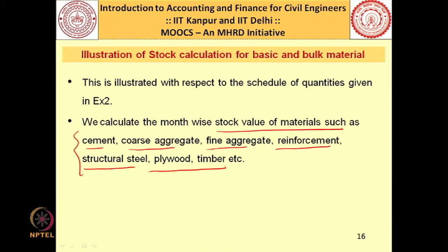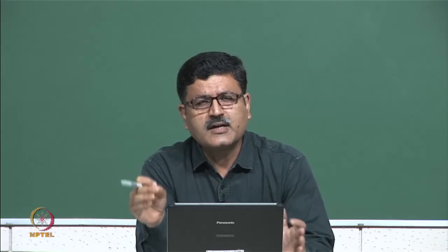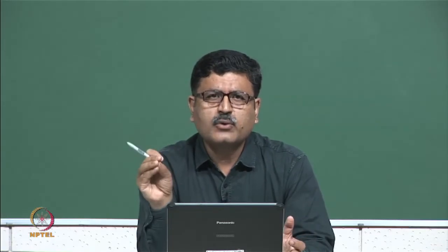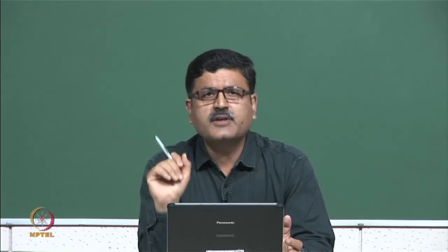What is happening? If you are stocking these materials in your stores, you are blocking some amount of money. If this money had been invested somewhere else, it would have fetched you some return. That return you are no longer getting, because you have invested in this stock and these stocks are sitting idle in your stores. So we must load the financing charges for losing the return which I would otherwise have got through this project itself.